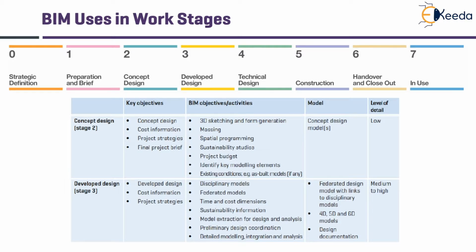Next, in concept design stage, we actually prepare a 3D sketch model using massing or spatial programming. The project budget is also simultaneously prepared. Schedules are being formulated. At the end, we get a conceptual design 3D model, and the level of detail is still low. In developed design stage or the third stage,